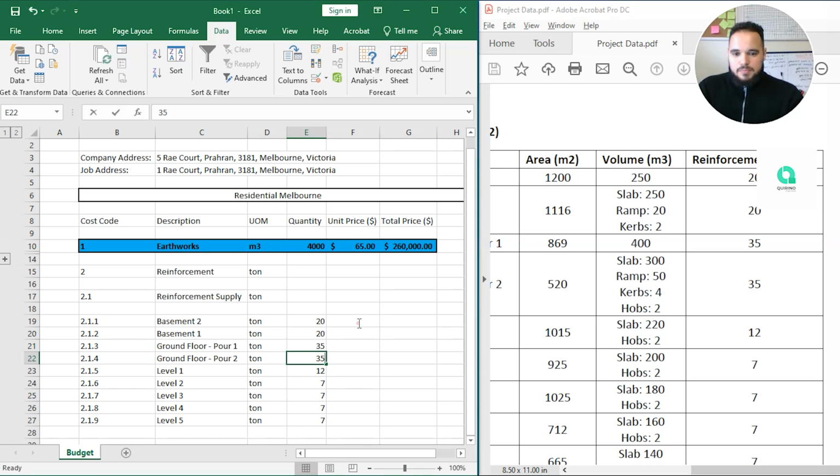Getting back to our job, what we want here is the unit price. Now, folks, you will see different prices in the market for reinforcement supply. If you are watching this video in May 2023, you will probably find it between $1,800 to $2,500 per ton.